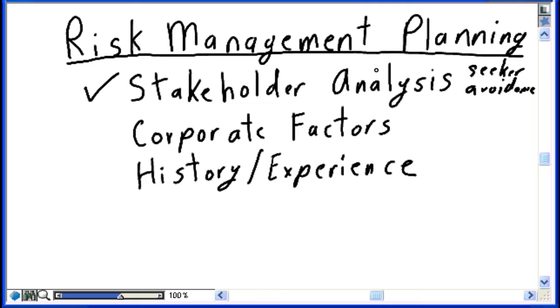Other projects are make or break situations. If this project fails, the business will be in trouble. These absolutely need to be risk avoidance projects. You need to ensure there's sufficient structure in place in your project. You need to ensure there's sufficient contingency and processes in place to mitigate and eliminate project risks before they're encountered, to ensure that your project does successfully complete.